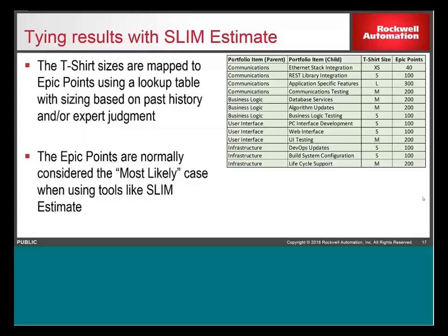Again, that's part of the tenet of SAFe, to be able to inspect and adapt and adjust based off of customer requests and needs. So for doing an entire train, I don't know if we've done the entire train at all. When we started the particular program that I'm working on now, we were doing full Scrum Agile, and we had done similar big rock sizing, and we've refined the estimates since then, and then we've had additional scope added, and again, scope changes. So what we started with is not where we're at today. So breaking it down into smaller chunks is probably the best way to approach it if you're trying to do that.